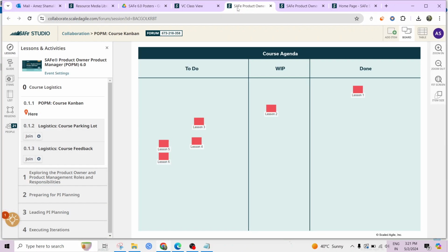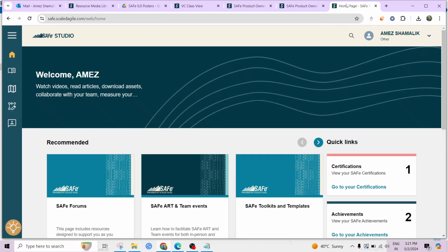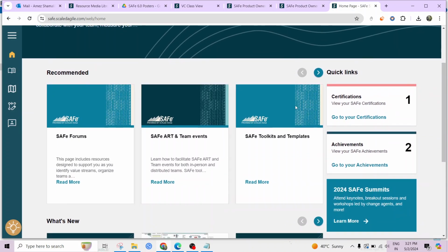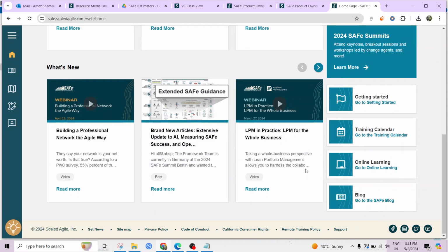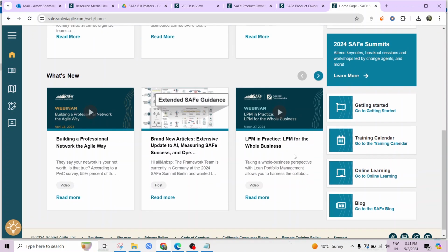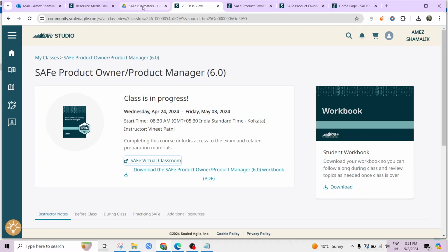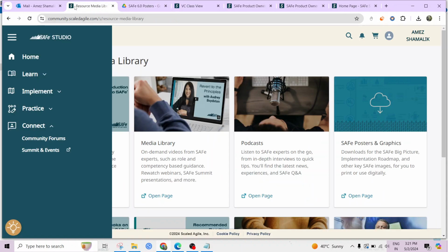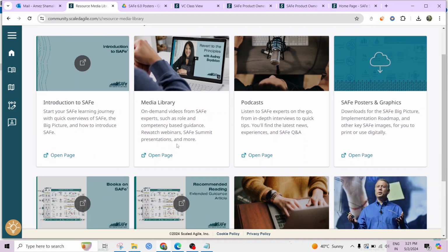See, functionality change is not the only thing. The team might have to spend more time on refactoring. This is all part of the work. Product managers and project managers think, oh, you're technical, you spend your extra hours for that. No, it is part of our work. Every technical work will be part of the product backlog. So let's say we are building feature 1 and we realize that it's legacy code, as you said, Gaurav. Legacy code means it needs dedicated effort for refactoring, so that new work has to be added to the backlog.